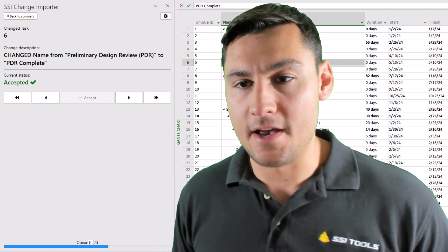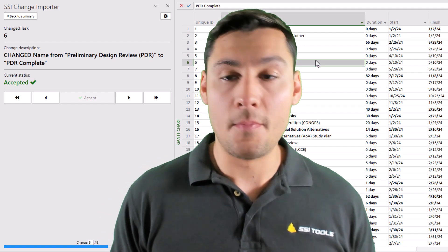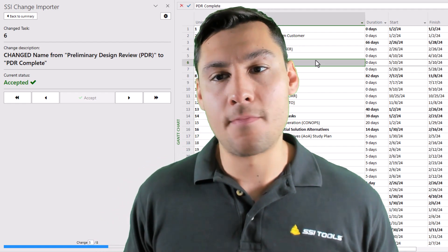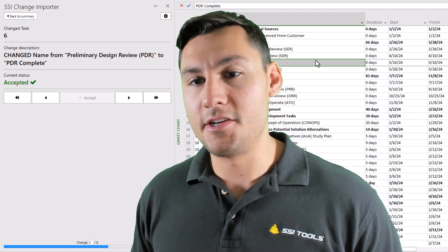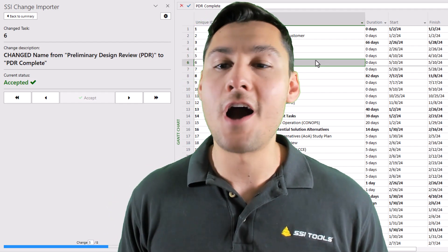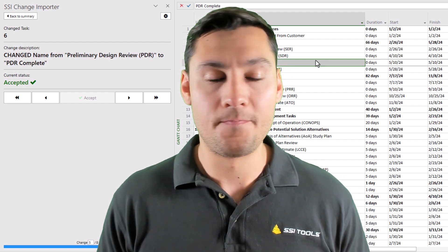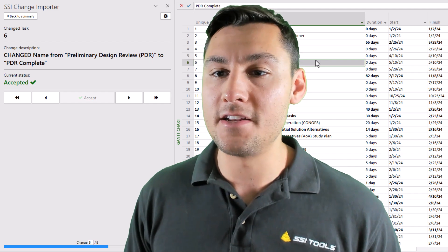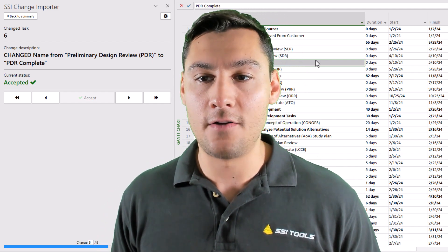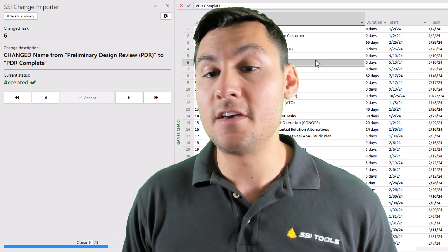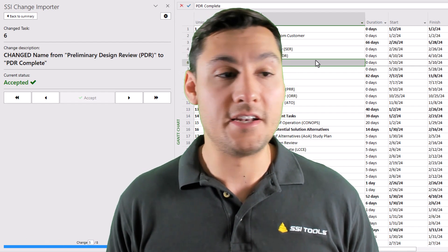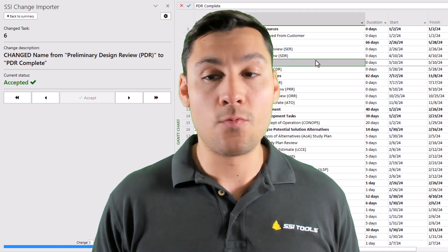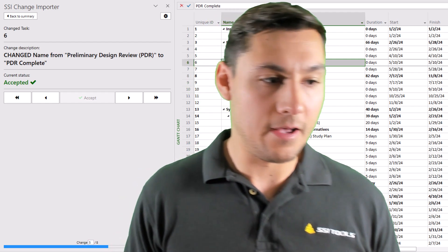A couple other examples. Let's say that you are trying to conduct status for your project file, a monthly status cycle, and you have one stubborn task manager who says, I'm not going to give you my status inputs in that Excel spreadsheet that you're giving me. Just give me a copy of the project file, and I'll make my changes in there. Well, we normally don't want to allow anyone who's not professionally trained in Microsoft Project to just edit the project file. But with this tool, that person can go into a copy of the project file and record those changes, and then the master scheduler can take their track change file and decide what to import and what not to import in a way that's not going to harm the project file.